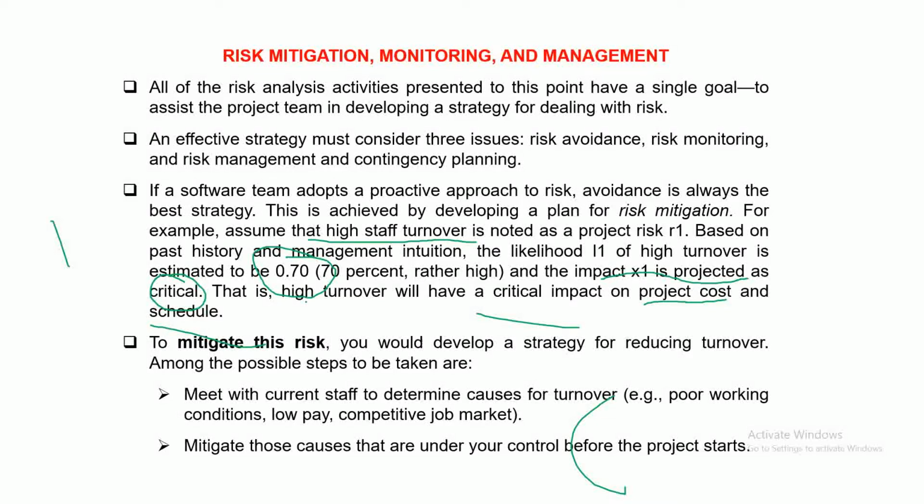So definitely if the experienced staff leave your project, then you will need to schedule interviews, you need to acquire new people, you need to bring new people into the project. You need to spend some amount of time and money on the proper knowledge transfer, and then they will be able to provide some benefit to the project.